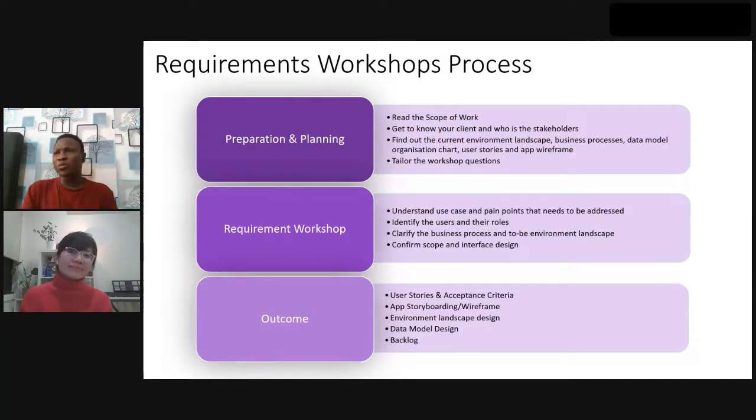What do you want the application to be able to do? Put those things down and note the ones that are possible and the ones that are not. Oh, we can't achieve this one yet. Is it a must? Using the MoSCoW terminologies, if you're a business analyst: is it a must have? Is it a can have? You have that kind of classification.